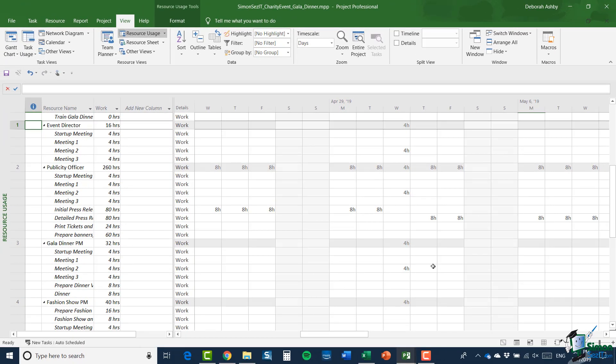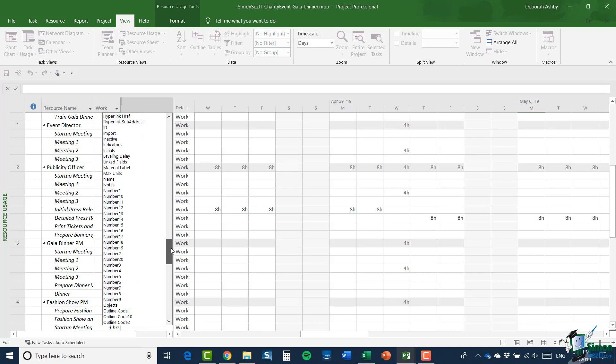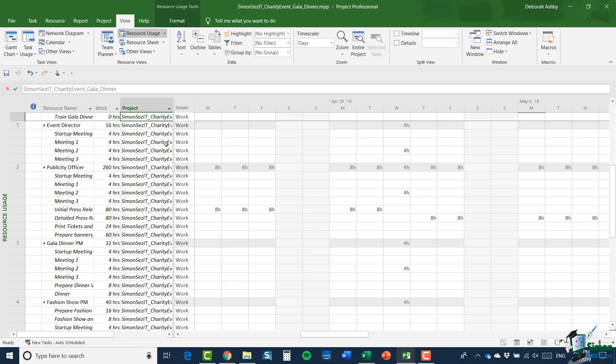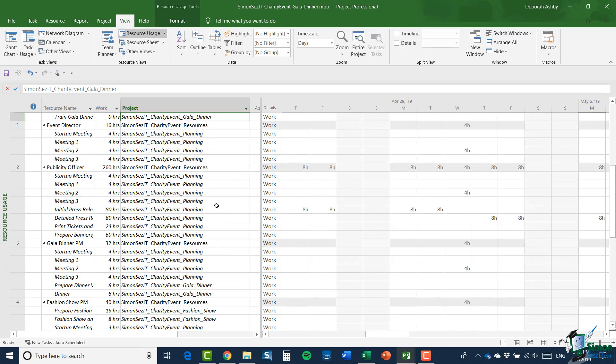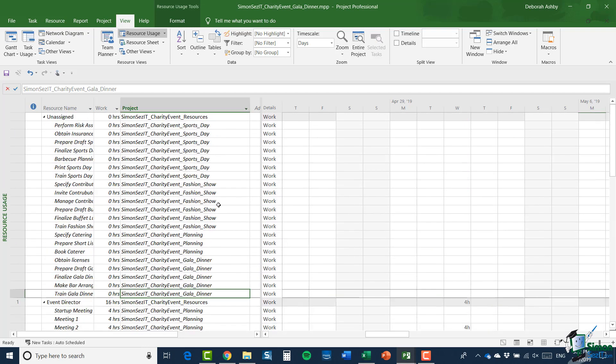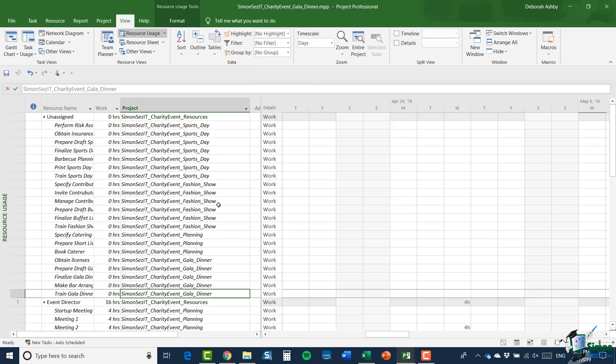I could see how those resources are used or I should say where they're used. And in resource usage view, one thing I could do is insert a column to show project. So, let's click, scroll down and select project and let's just widen that column out very slightly. And even though I only have the gala dinner project open, I can still see where the resources are used in relation to other projects. So, it's really worth noting that even though I don't have all of those other projects open, the resource pool is aware of where the resources are being used.